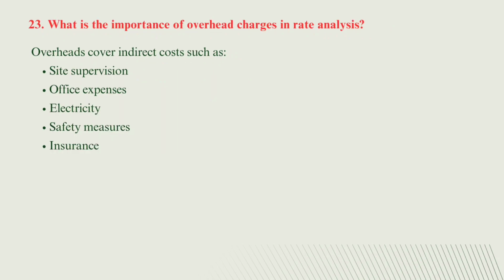The next question is, what is the importance of overhead charges in the rate analysis? Overheads cover indirect costs such as site supervision, office expenses, electricity, safety measures and insurance. So to maintain proper estimation, it is important to keep the overhead charges in the rate analysis.